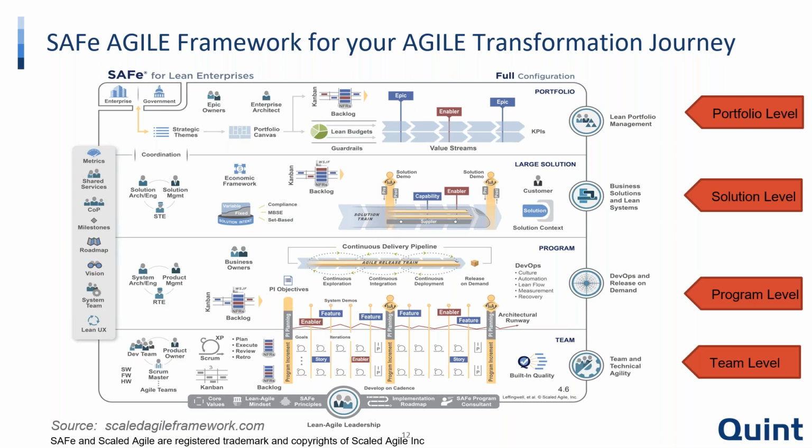During this, you get all the Scrum teams together for a 2-day window to do planning for the next 2 months. At the same time, you also take a consolidated program increment demo, which we call the inspect and adapt session. And then there is an opportunity for teams to perform learnings and continuous improvements through programs called hackathons and innovation. This also gives customers an opportunity to get together.